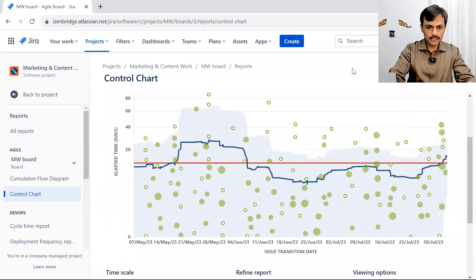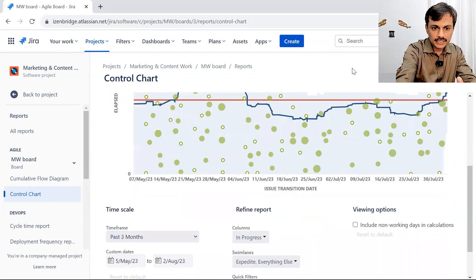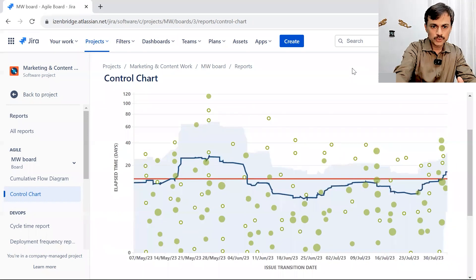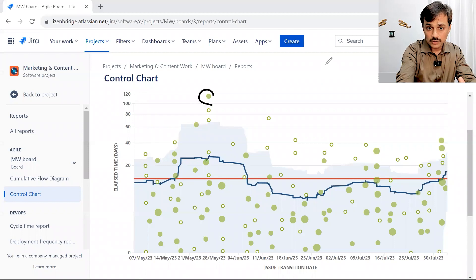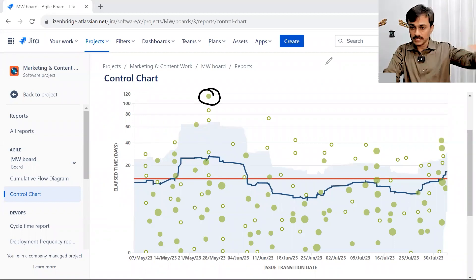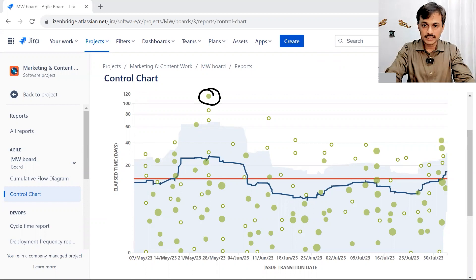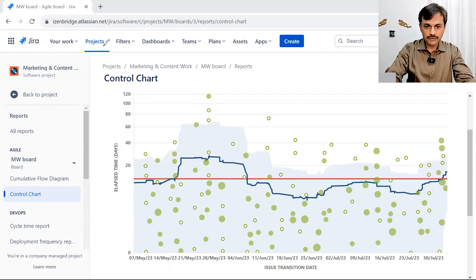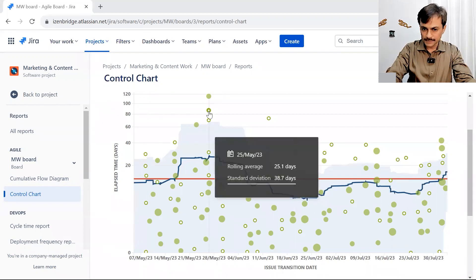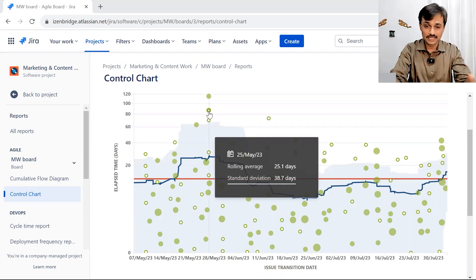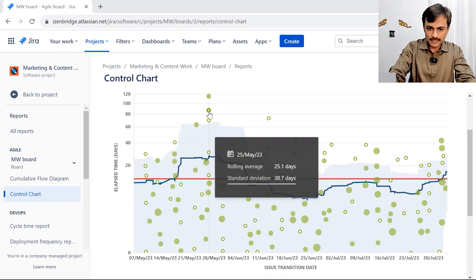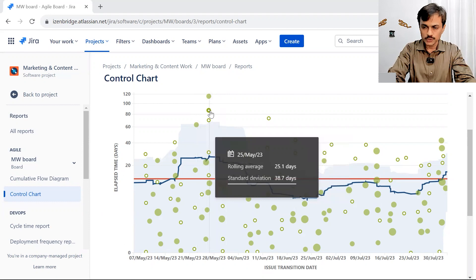If anything is above the red line it means those items were taking more time — those are outliers. Some clusters of issues took 120 days or more. In Jira, I can click on a particular issue to get information about it: what was its overall rolling average at that point in time, what is the standard deviation, and I can click 'more' to find that particular issue as well.